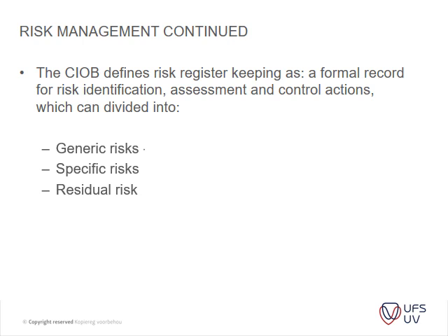This is the stuff that you will always have on a construction site. For instance, the risk of oversupply of material, or if you overmeasured, or if you undermeasured and you have to ask for more material, or you have to send back material at a certain cost. So that's for the contractor, an example of a generic cost.